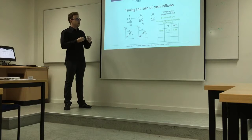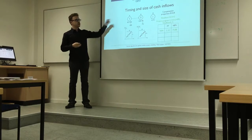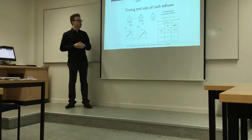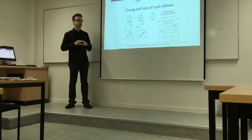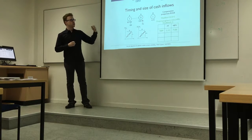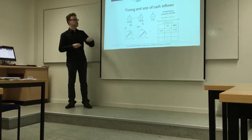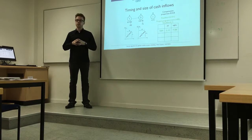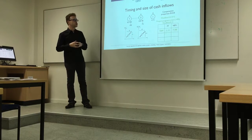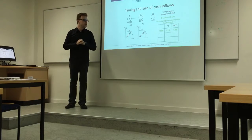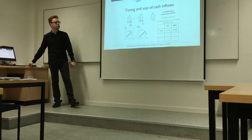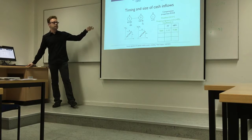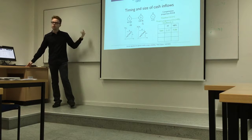To determine the project's net present value, we first determine payment times. For two payments with a project deadline of 10, payment times are found by dividing the deadline by the number of payments: 10 divided by 2 equals 5. The resulting NPV is 75.88. This is exactly equivalent to the progress payments discussed earlier, for those following closely.